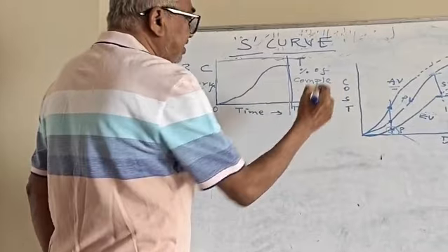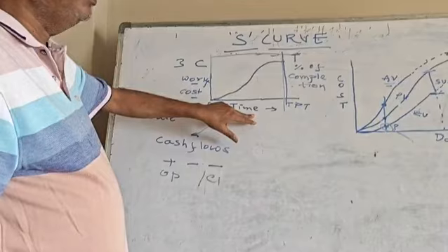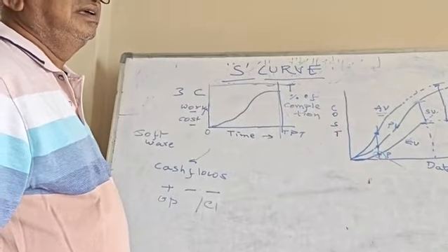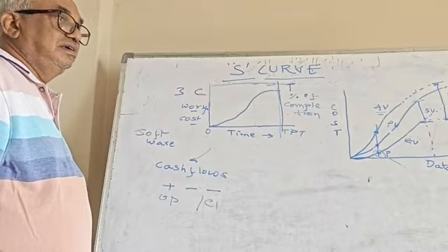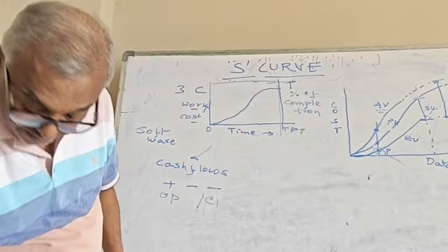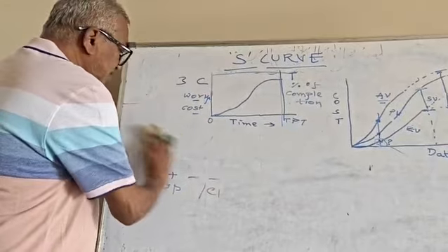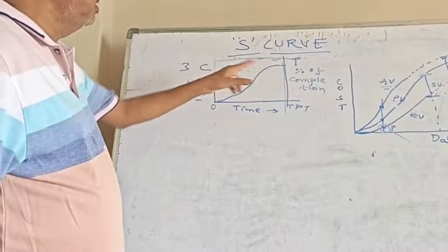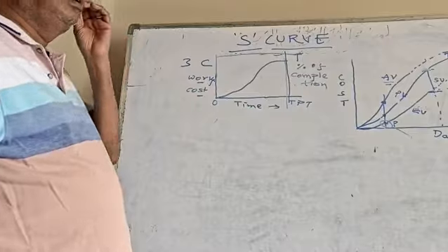On the y-axis, here you can use the cost, here you can use the time, and here you can use the percentage of completion. Normally this is missing in many of the lectures and many of the works that have been already published. So what I mean to say is the same thing, that is, for the project we try to work out a cumulative graph which speaks about the work, cost, time and percentage of completion. Now how is it useful?